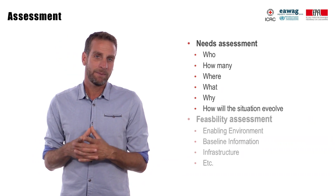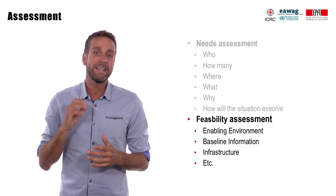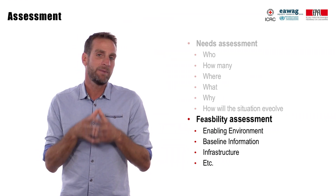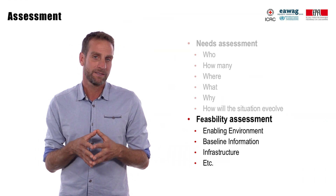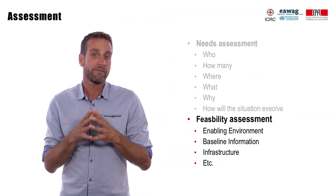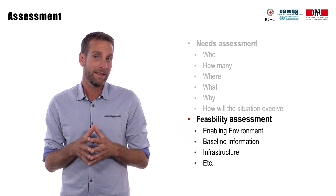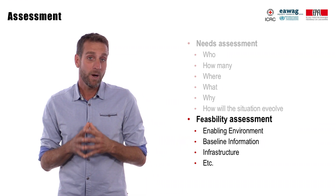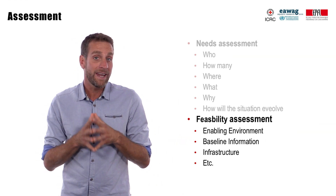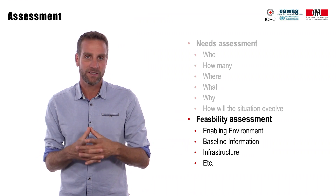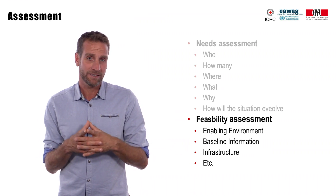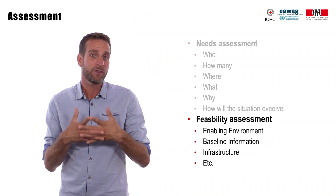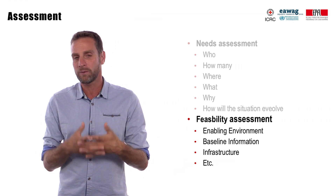Another type of assessment is the feasibility assessment, which aims to identify the possibility of undertaking a given humanitarian action, such as implementing an engineering project. It focuses on the factors likely to affect directly or indirectly the implementation and the success of the project. In such an assessment, you have to gather information on the enabling environment, such as the regulations, the capacity of service providers, information on the features of the areas, the state of infrastructure, and other relevant technical information needed to carry out the project.